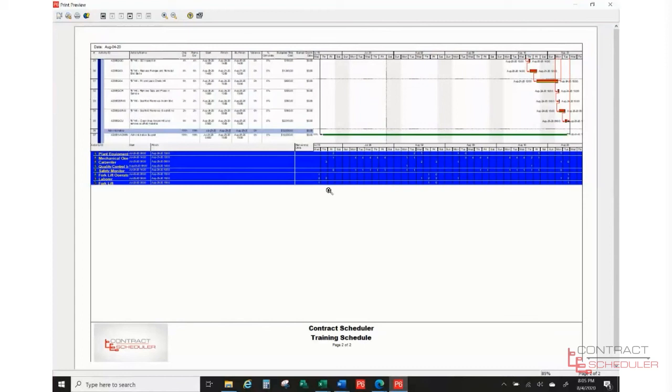This helps us when we're allocating our resources. And if you have multiple projects and you need to ensure that you're not over allocating resources, you want to make sure you have all those projects open and then do the same thing, right? Select all of them, highlight all of them over here, collapse the field, divide by 8, and it will tell you how many people you need each day in a particular skill set.